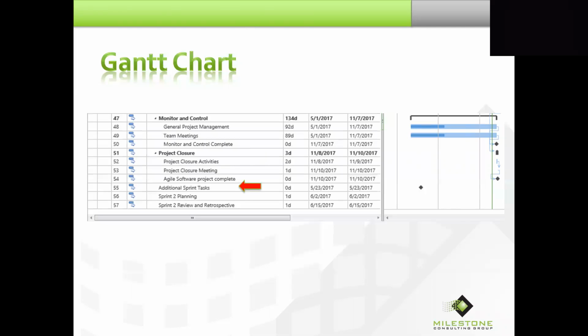I put it at outline level 1 because as we're going to see, if I were simply to add new activities, because many times you have to add new activities, either new user stories or new activities that you want to track time against, the project server will automatically add those new activities at the very bottom of the task list at the outline level of the last one.